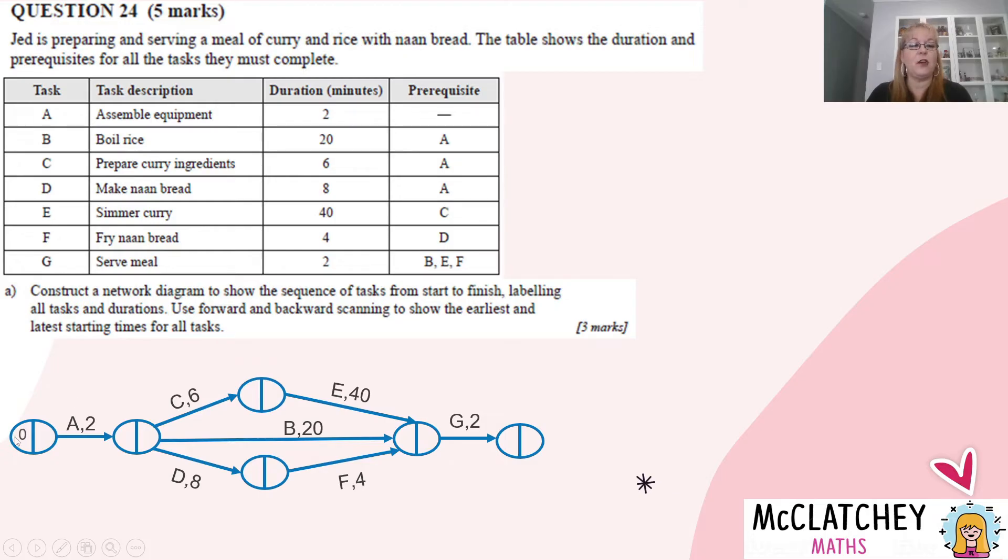So let's start over here. We always know that we start in the left-hand side of each of our bubbles. And our very first time is at time zero. And we're going to add zero to two, and that will make two in this next bubble here. And if we go across the top here, two plus six will make eight. And then two plus eight makes 10 here.